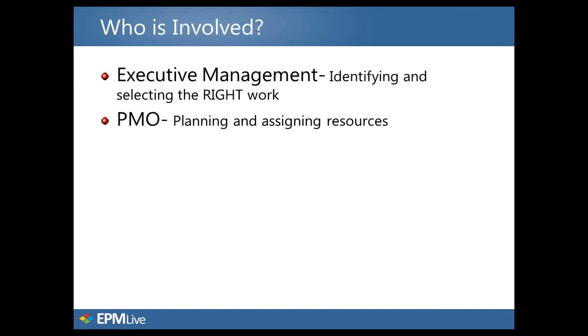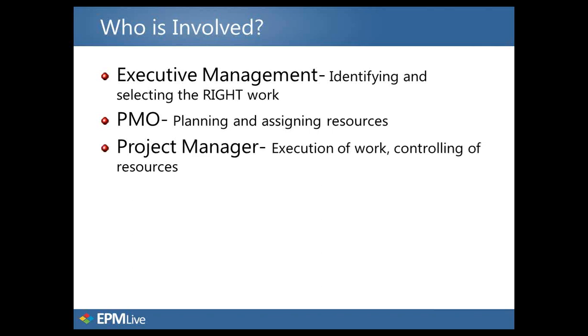In many organizations, the PMO will be in charge of inputting resource data into the resource management tools that you use. The PMO will play a key role in the first 2 steps in the resource management lifecycle, including planning the resource roles and identifying the right resources to fill those roles. The project manager will be involved primarily within the execution rather than the early stages of planning, so resource planning, portfolio management planning, etc. Once the resources are assigned, the project manager will be accountable for the resource performance.